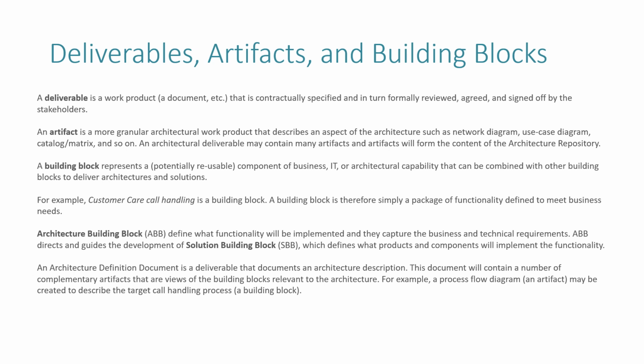What is that work product? Whether it's a deliverable or an artifact or a building block, and you need to select deliverable. So a deliverable is what we actually give to the client, for example, an architecture document. And artifacts are what we produce, which can be part of the deliverable also.